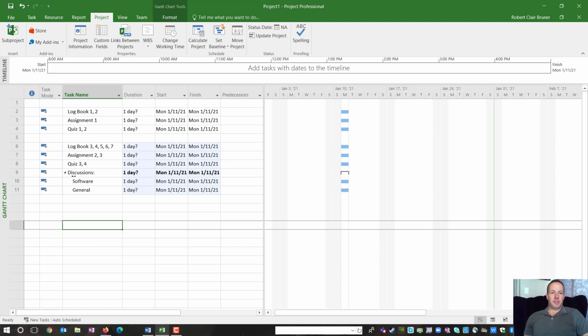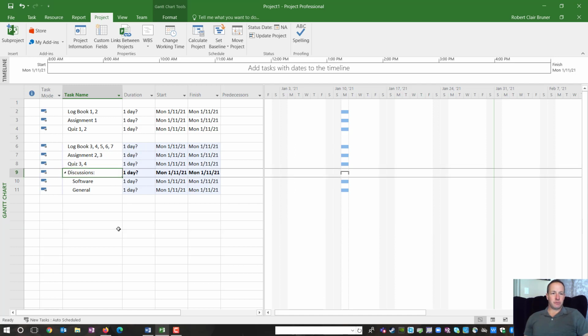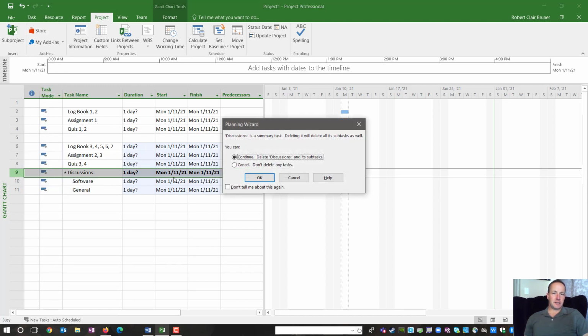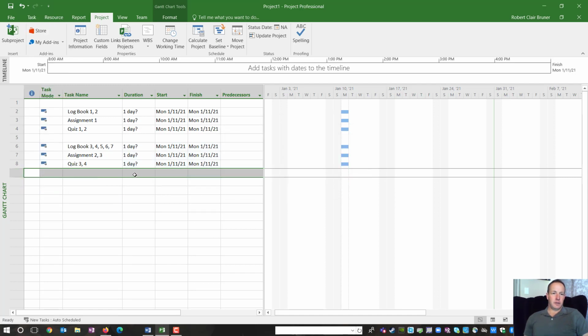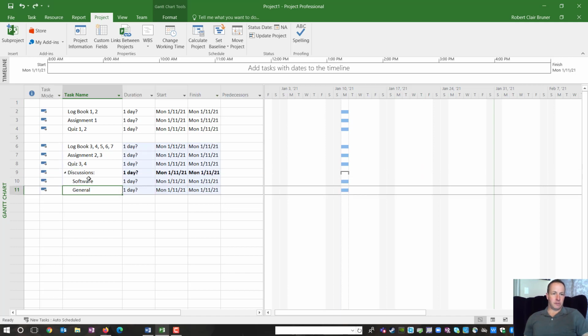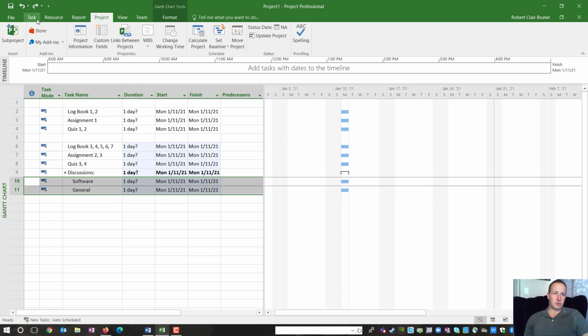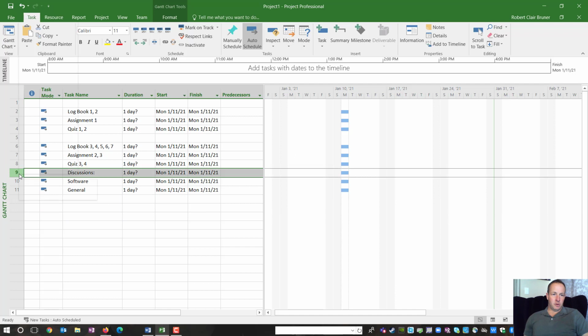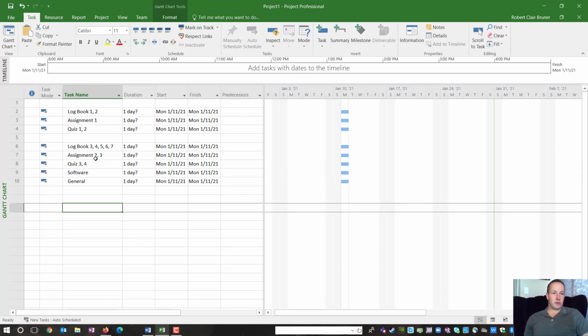Now, one thing I'm going to do is, see, this is a title for discussions right here. I don't want that, and right now it's set up as a summary because these two are indented under it, and I don't necessarily want that. So I'm going to delete that task. Oh, I didn't want to delete all of that. First, I'm going to move these two out: go to Task and hit the outdent button, because then when I delete Discussions, it won't delete those two things also.